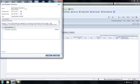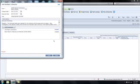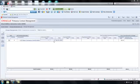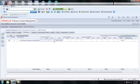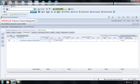Notice I have an opportunity to deselect if I selected inappropriately. So right now I'm going to select Ace Mason, and when I click Finish, an RFP has been sent to Ace Mason. When I look at this row with Ace Mason, I can see right now that we're in the estimated phase of this change management process with Ace Mason.